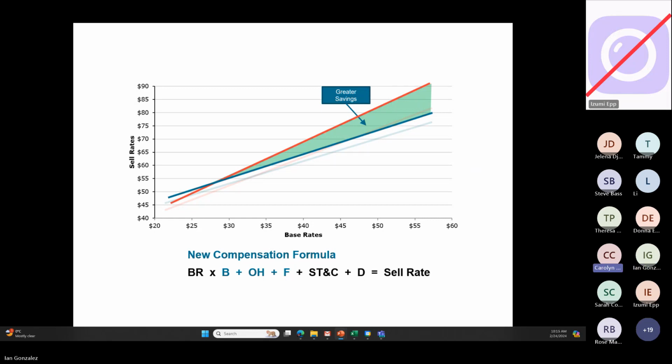Okay, go ahead. How do you find that the suppliers are accepting when you ask for this level of transparency in their cost calculations? My experience, yes, because when you have a cost reimbursable or even time and material contract with the supplier, they have to tell you these components because that's how they get paid, right? They have to break it out. Otherwise, you don't just blindly pay them a number for the hourly rate and you don't know what component is overhead and fee. So they'll do it regardless, right?